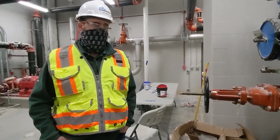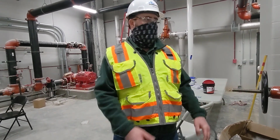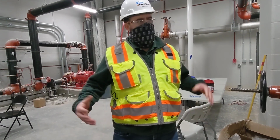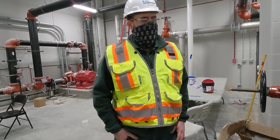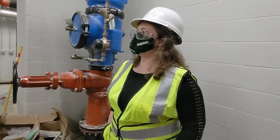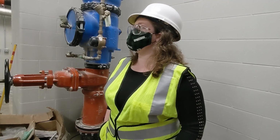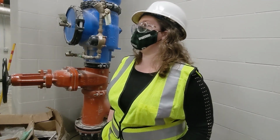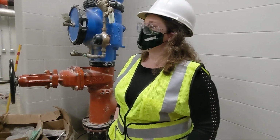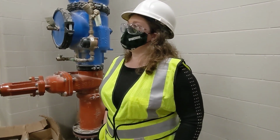Yeah, and that can be very difficult too, especially when the building's under temporary heat. Mm-hmm. So it's just making sure you're getting the proper BTUs on your heaters and fans moving to make sure you don't have hot spots and cold spots and whatnot. Right, yeah, that's incredibly important, especially in this industry where the flooring is subjected to much heavier loads on a regular basis than the normal environment, because there's all the heavy medical equipment and constant walking that goes through on this floor.